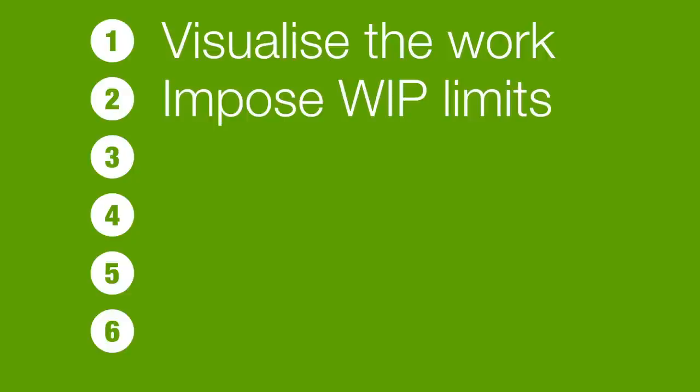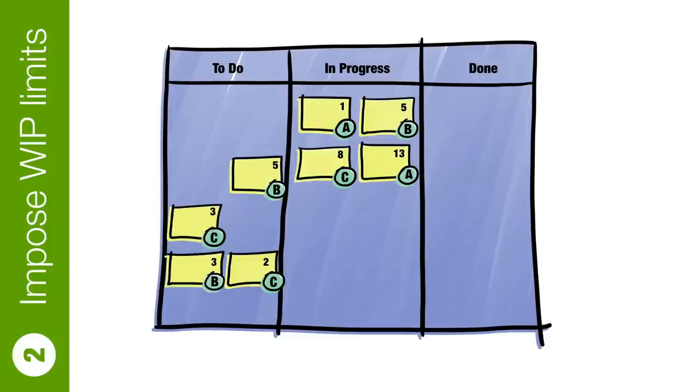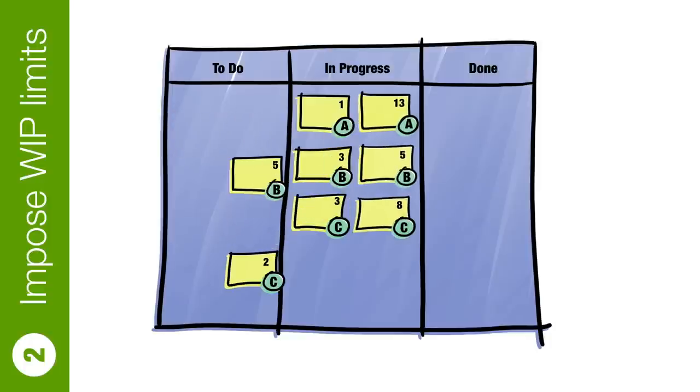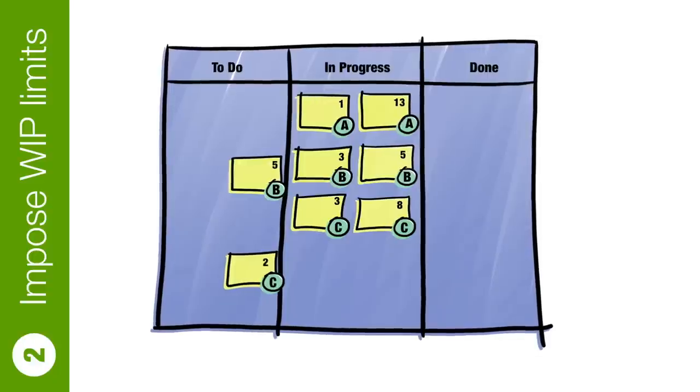Step two: impose work-in-progress limits. If you know anything at all about Kanban you'll know that one of the things it does is impose work-in-progress limits. I'm going to rewind to the beginning — and this time each developer is allowed to work on a maximum of two tickets at any one time. Ideally it would be just one ticket, but we know that things happen and tickets can get blocked, so we're giving people just a little bit of leeway. Fast forward a couple of days and it seems all three developers are working on exactly two tickets. They've stayed within the letter of the law, but the spirit of the law? Not so much.